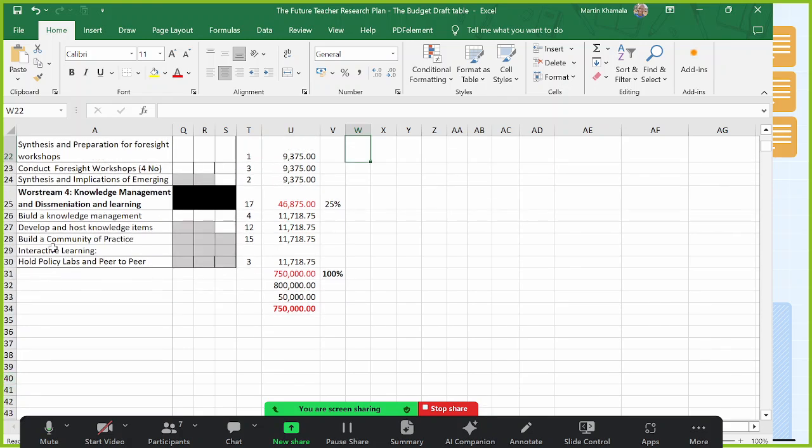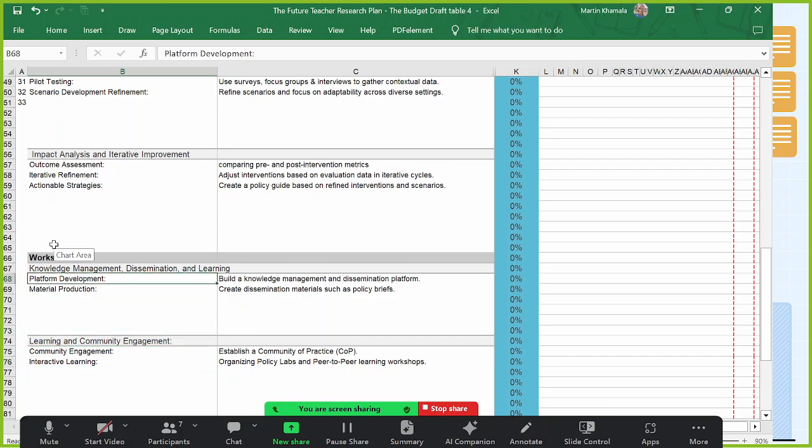Yeah, so let me explain what I see happening. I'll come to this document here. You need to build a platform. This is going to be a website, a web app, a mobile app. If you want people in Kenya and also in Ethiopia to see it, then it's going to be a web app covering both countries. This will involve prototyping, but also preparing a working prototype before we actually roll it out in the countries. It'll have to be tested. It involves a lot anyway, because we have to get the cloud resources and then go to the site to make sure it's working. So that's what I see as a large part of what we're doing.